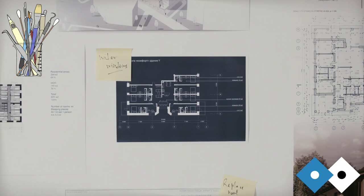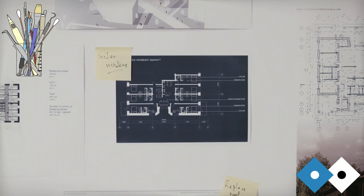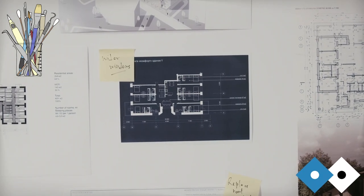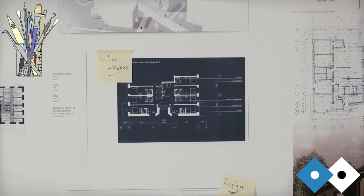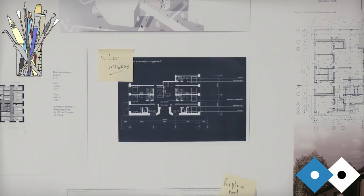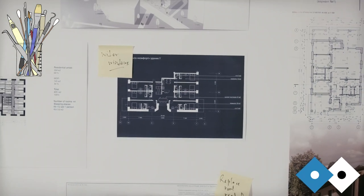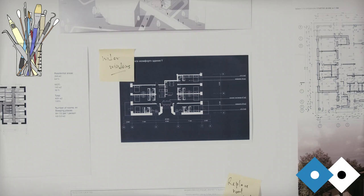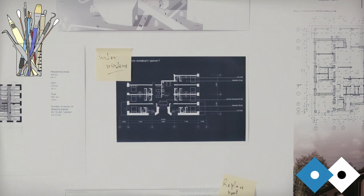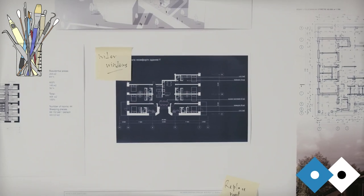And then, latterly, to get contractors who could work on the gallery and actually create it, a building contractor, to do the basic works of taking out strange extra supports from the gallery space, or laying a new floor or putting a lift in or any of the other kinds of things, creating new openings through the walls. To get a building contractor for that proved to be nearly impossible because once COVID had begun to ease, you couldn't get a builder for love nor money. Because everyone was so excited about getting the work done. Yeah, everybody wanted building work done.